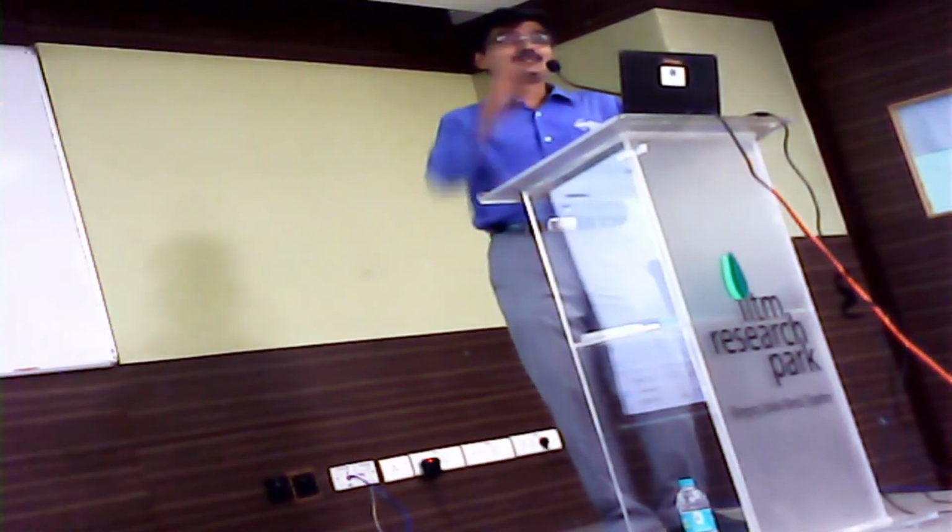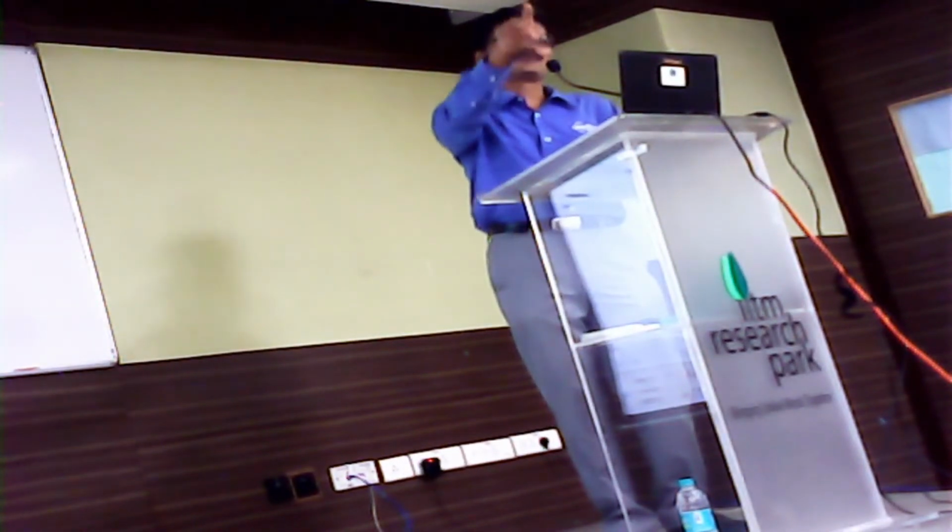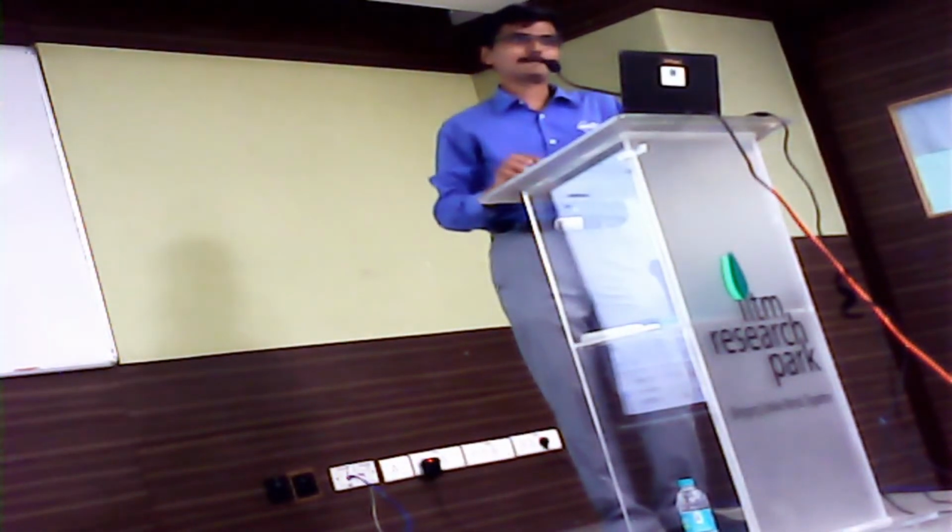The moment I say the first task has taken another 2 days more, you'll notice the forecast is automatically getting updated. Because it got completed on 12, this task is also getting updated and the other dependent task is also getting adjusted. The baseline start and finish will not change. It is editable, but don't edit it. That's what my point is.